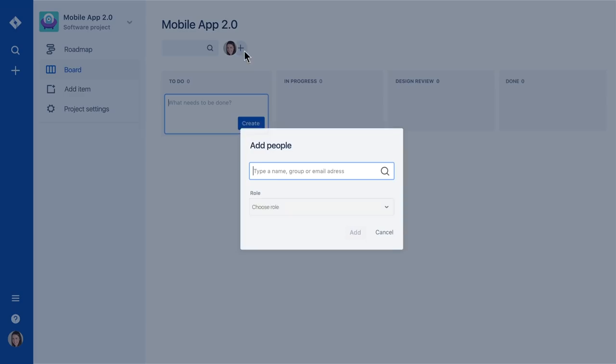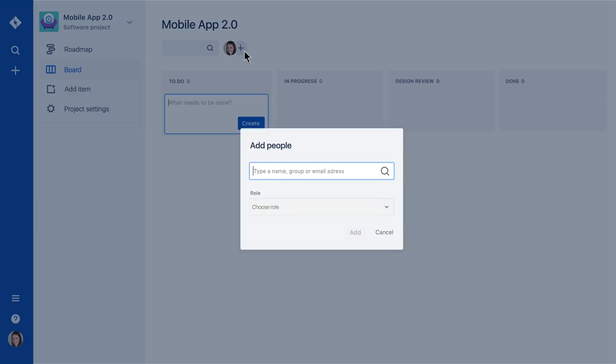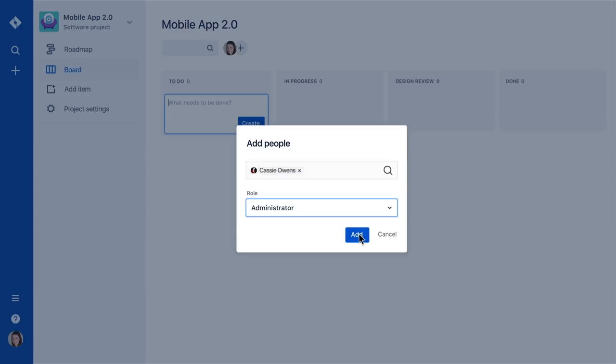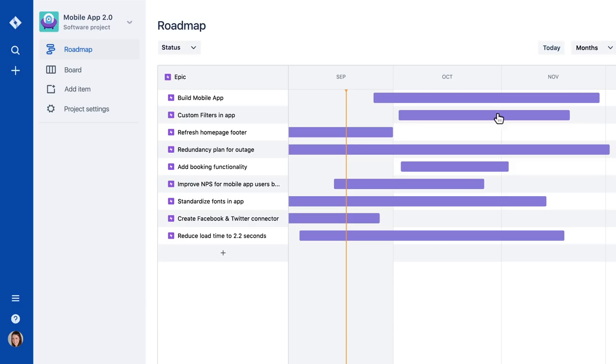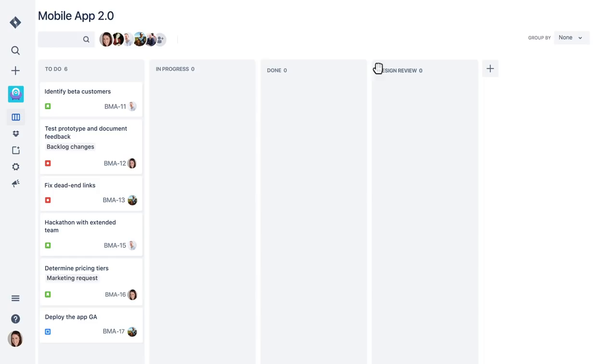Now it's time to invite my team. One of the first things we need to do is sketch out our big picture roadmap items. Because the roadmap lives in JIRA, it's easy to keep up to date, especially as plans change. Once my team is comfortable with our strategy, we simply break this work down into smaller pieces and begin building our backlog.